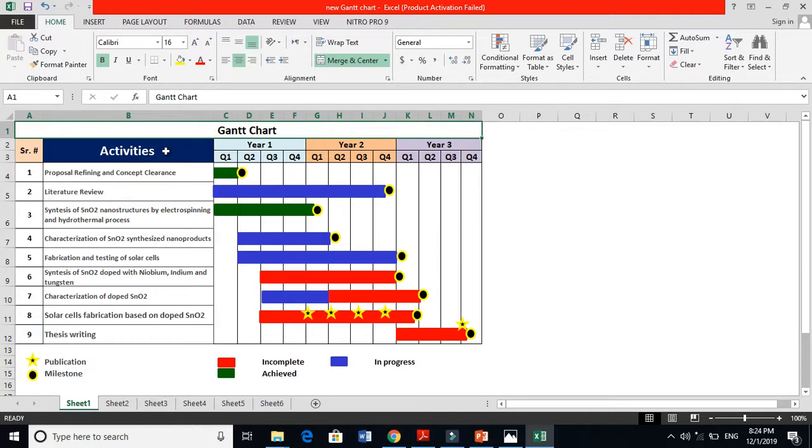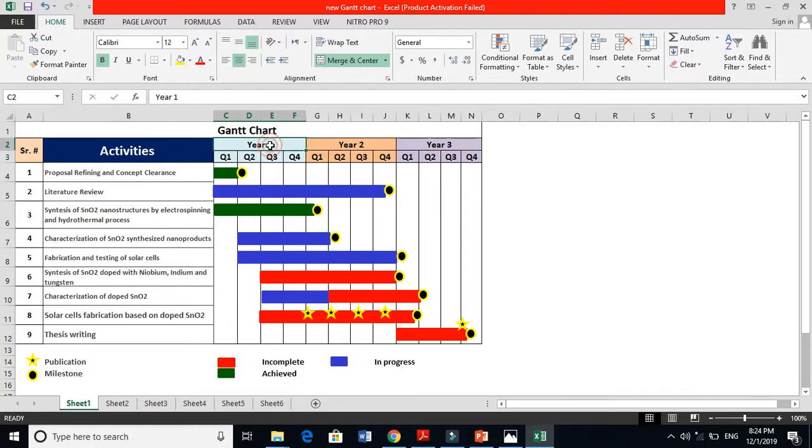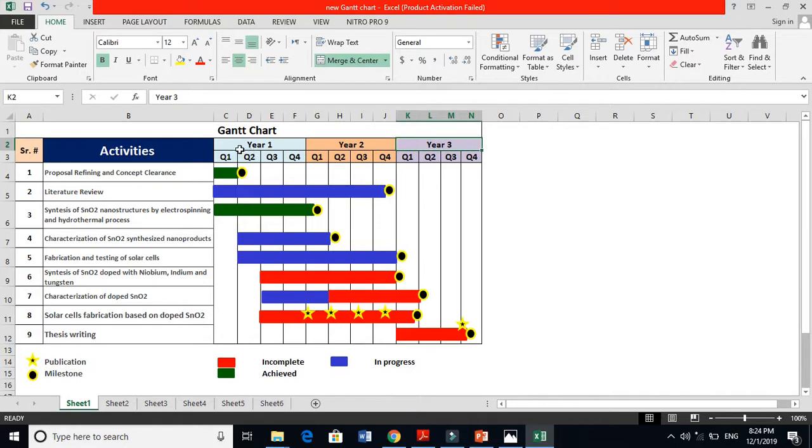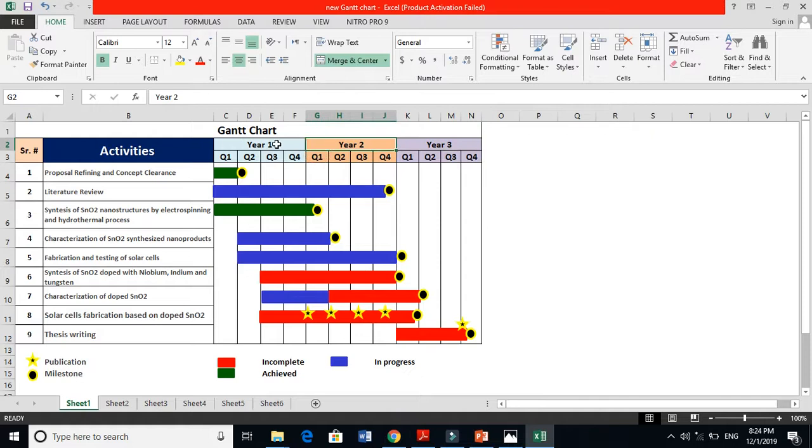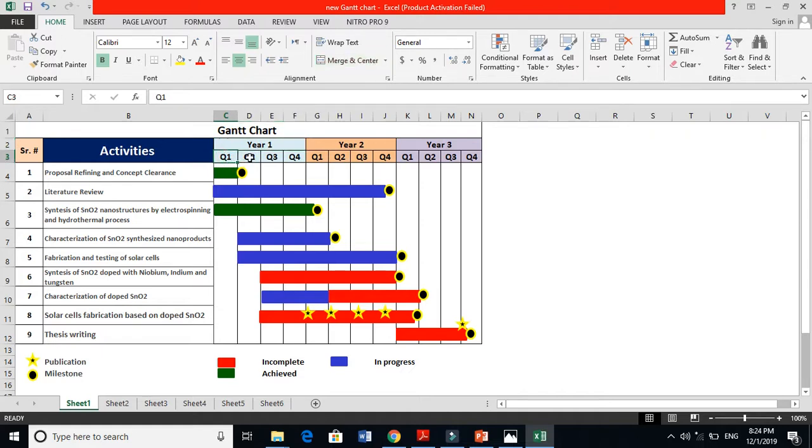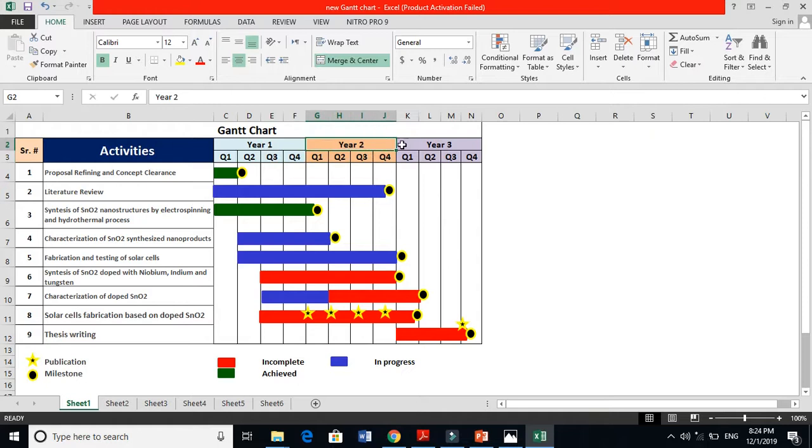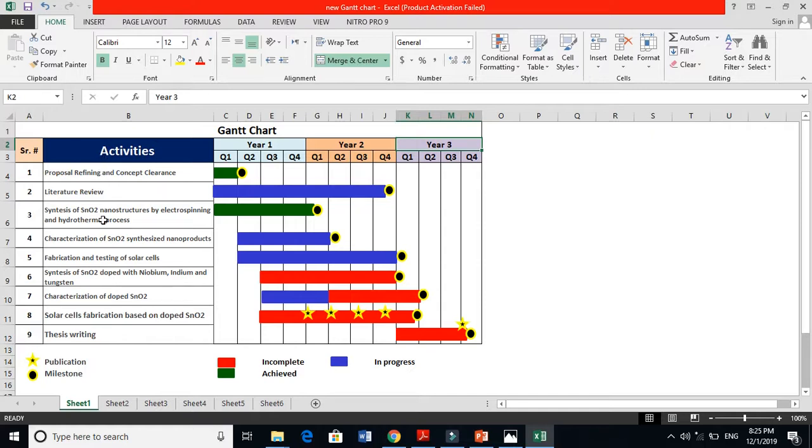For instance, this is the Gantt chart sample - this is my Gantt chart. My PhD was basically three years time, I got scholarship for three years, so I have to finish my PhD in three years. I then further divide this year in quarterly three month periods: quarter one, quarter two, quarter three, quarter four. Similarly second year, similarly third year. This is the serial number and these are my activities, and this is my first year, second year, third year.